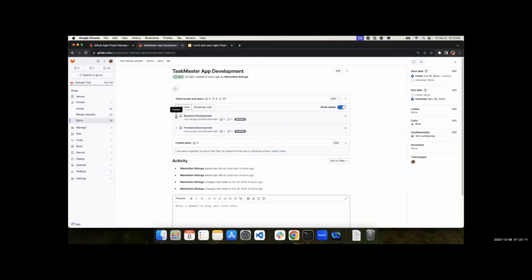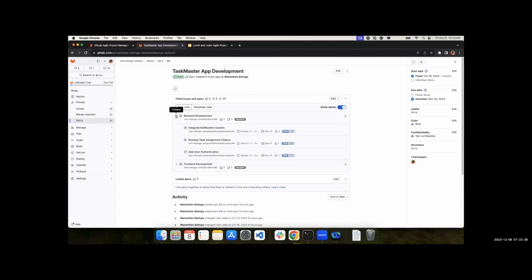Epics in GitLab encapsulate various elements. You can consider an epic as a big chunk of work, as Brian was just depicting before, like big stories or projects. They help describe and gather all the information about this big part of work. Within GitLab, epics function similarly to issues, but offer the ability to attach multiple child issues, creating a hierarchical breakdown.